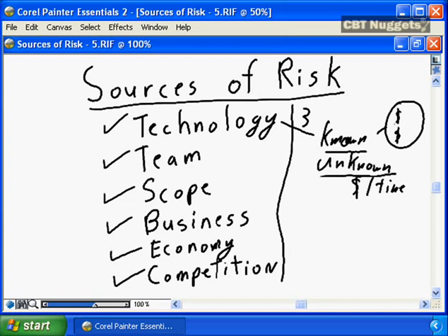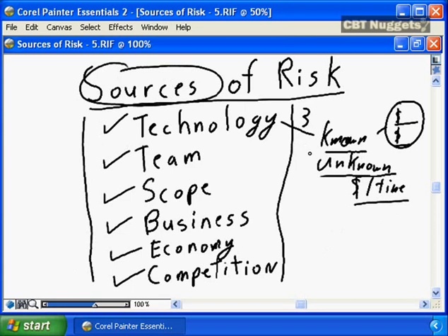If you have specific funding for known risks, deal with it specifically, have additional allocation for the unknown risks. The key in good, successful risk identification is look at all sources of risk and ensure that you're covering all possible areas and providing the additional allocation for unknown risks, because there will be unknown risks that are going to impact your project.